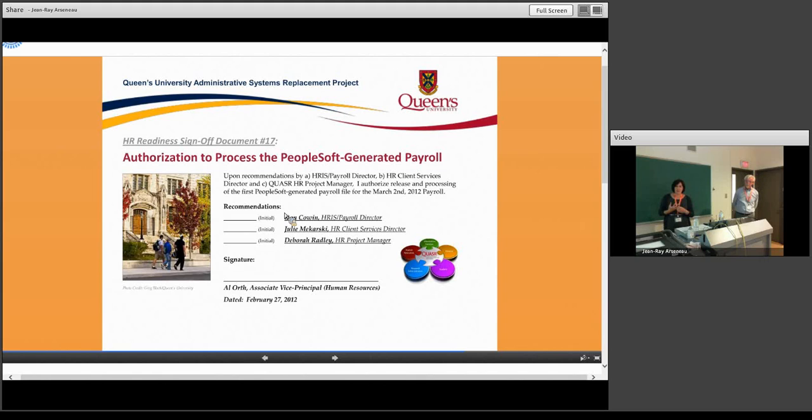And we actually held pilot sessions with our training materials. What we did is we used our user acceptance testing, and we had jump start training. So we piloted the training materials at the beginning of the user acceptance testing as a way to get the testers off on the right foot, and so that's increasing their engagement. At the same time, we were demonstrating that these materials are viable. So that was just kind of an example, and then after that we delivered the real training.